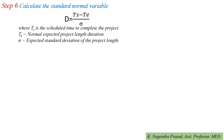The next step is to calculate the standard normal variable: Z = (TS - TE) / sigma. Here, TS is the scheduled time to complete the project, which is 40 days. TE is the expected project duration, which is 36 days. Sigma is the standard deviation, which is 5. Substituting: Z = (40 - 36) / 5 = 0.8.